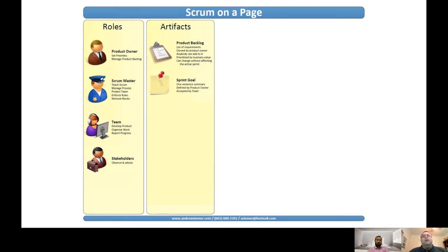The next thing is the sprint goal, or the iteration goal. And this is the main objective of what needs to get done in the current iteration. This iteration can be of any duration, but in my experience for proposals, 1 or 2 weeks work very well. In software, other durations are generally used. You also have a sprint backlog, an iteration backlog. This is what you're trying to accomplish in that 1 or 2 week time period. It's a subset of the proposal backlog.